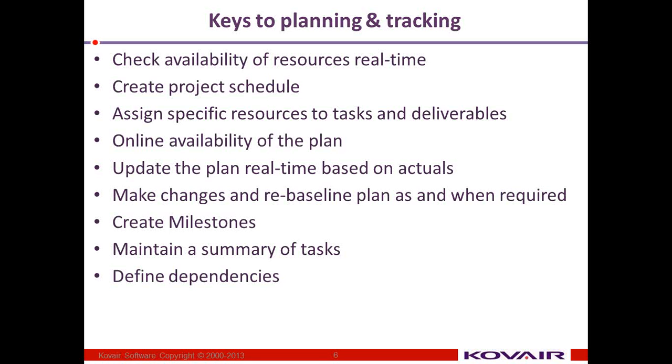Then we have maintain a summary of tasks. Now what is this? It is something like a milestone, but as we know, in a milestone we do not associate any resource, whereas a summary task is a task which can be broken down into subtasks, so that it's not necessary to track all the subtasks, but at the summary level also you get a proper picture of what is going wrong or where we are in terms of the progress of the project.